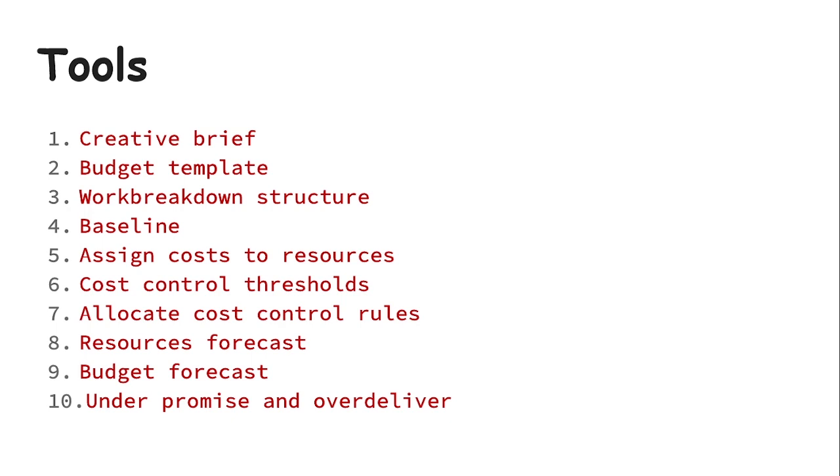And what next is to create a cost threshold for each category. For example, you can decide that, you know what, I'm going to spend $1,000 on maybe designing brochures, and I'm going to spend maybe another $1,000 on the website. And here you're estimating, and you know that this is actually the money I want to spend on this project, on this task. But if it goes maybe under, you're already in line with your budget.